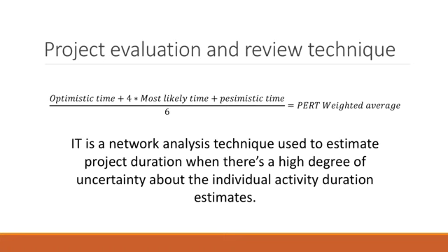that's going to be your most likely time, because you guys have done the whole critical path analysis, you have done the critical chain method, you have added all the buffers that you needed, and you have a most likely time to happen. After that, you are going to analyze, well, now what if we go optimistic about this? What will be the fastest way that we can do it? And then what if we go pessimistic about this? What is the worst case scenario? You add all those values, you divide by 6, and that will give you the weighted average.